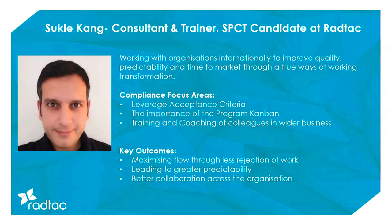The definition of done is a great way to bake in a lot of those quality practices. One of our core values is built-in quality, and the definition of done is often a really good way we can ensure those quality practices are being adhered to. One of the common questions I get when I'm delivering training classes or coaching is, what is the difference between the acceptance criteria and the definition of done? One way to look at it is, if you're always putting the same acceptance criteria against each feature or each story, then that could well be a good candidate to go into the definition of done instead.